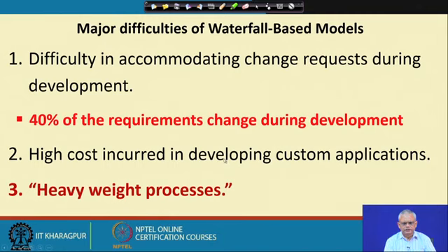Because in the waterfall model, you need to define the requirements, all the requirements, then design, code, test and so on. The customization may be just we need to change some small aspect of an already working software. So, the work here may involve understanding what is required to be changed, changing only those parts, doing a regression test and so on, and those are difficult to accommodate within a waterfall model.